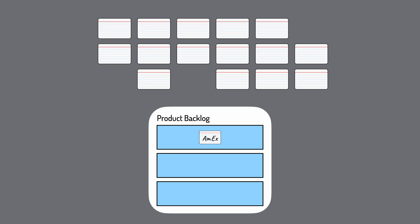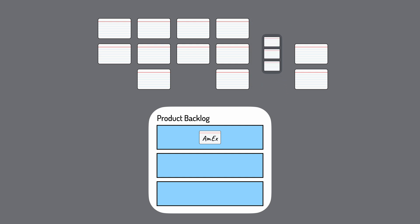Second, because a column of cards represents different ways of doing something, the entire column can become one product backlog item. If our map has a column of different ways to pay, that column can become one big product backlog item.